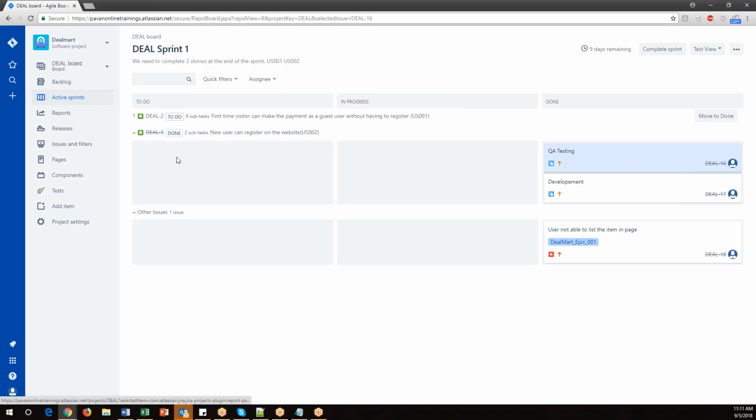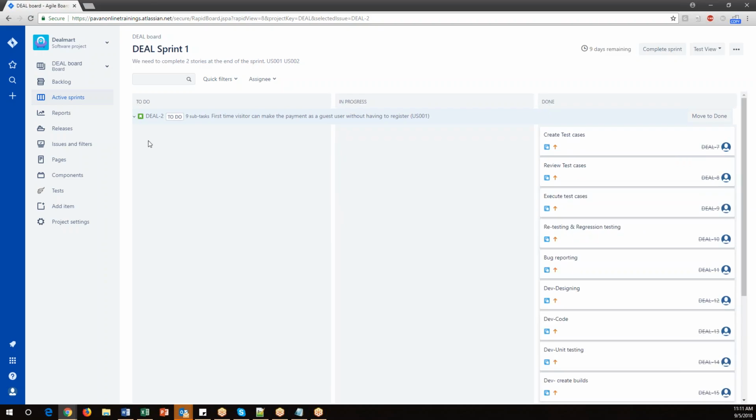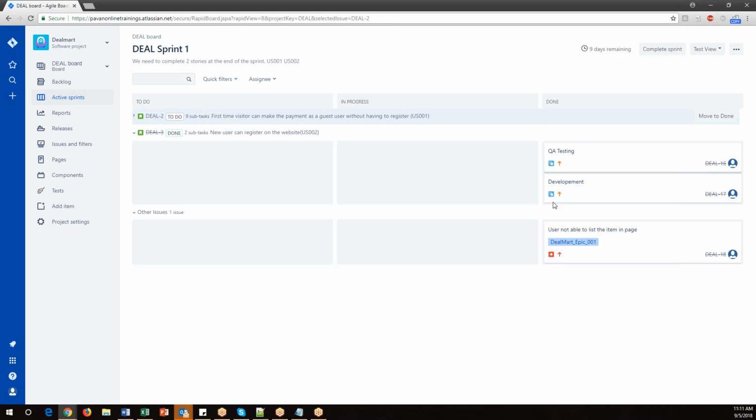Go to active sprint. Before that, we need to verify. These are all activities done by the Scrum Master: whether all tasks have been completed or not, is there anything pending, why it is pending, and if anything is pending, they will move it to the backlog again. So these tasks are normally done by the Scrum Master. Our job is to tell only the status part: what our tasks are, how we are progressing, what things we have completed, what things are still pending, and when we are going to plan them.